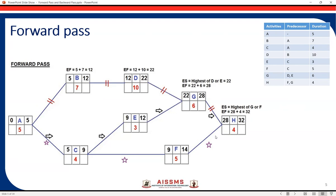We have now calculated for all activities except the last one, activity H. H is dependent on two activities: activity G and activity F. Activity F finishes at earliest by day 14 and activity G finishes at earliest by day 28. We take the highest, which is 28. Activity G's EF acts as ES for activity H. Early start for H is 28, plus duration four equals 32. So the early finish for activity H is 32 — activity H can be finished at earliest by day 32.